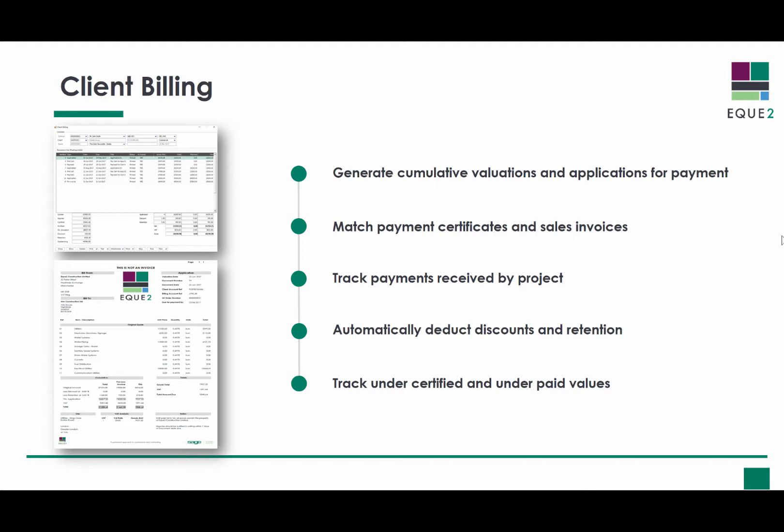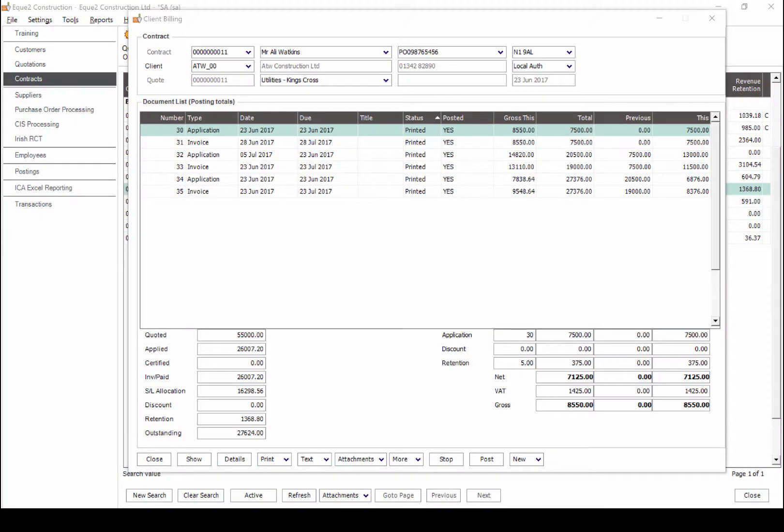The module automatically deducts discounts and retention, allowing the ability to report on retention held by project and by client, and to track under certified and under paid values by project.